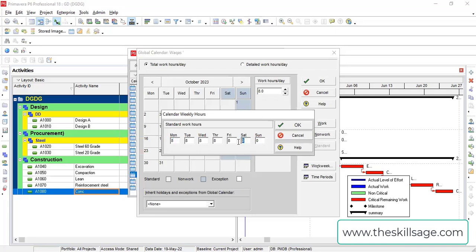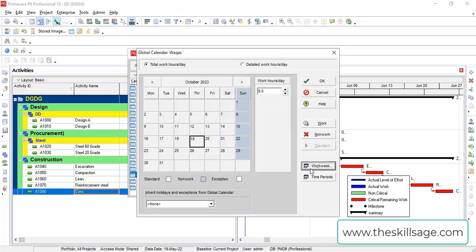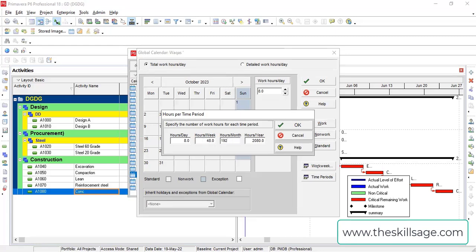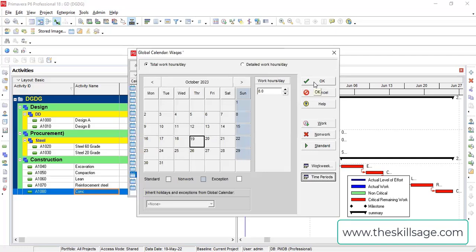Now I want to make off only Sunday, and that's fine, 8 hours. So in this time period, I have 8 here. 8 multiply 6 is going to give 48. Then per month multiply 4 is going to give you 192, and then this multiply by 12 is going to give you this one. So now I have just in recent times, in front of you people, I have defined two different calendars.